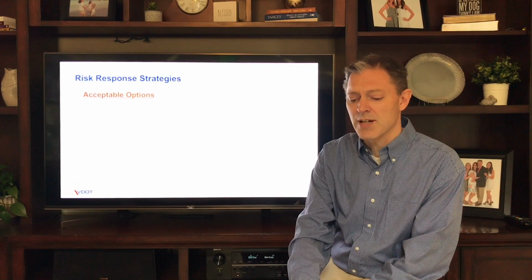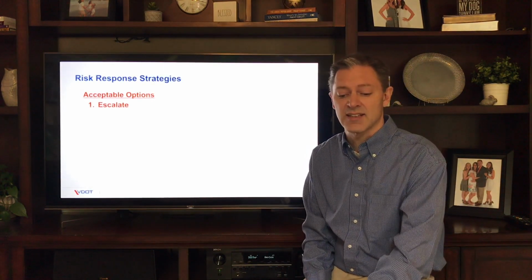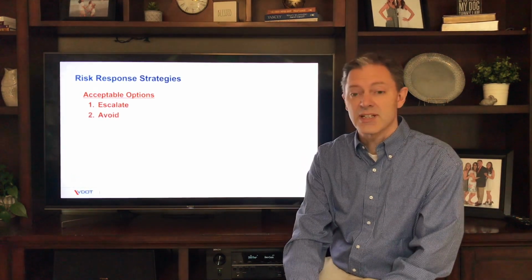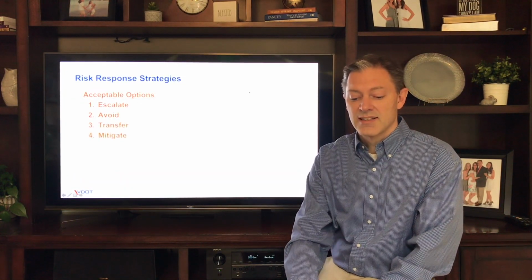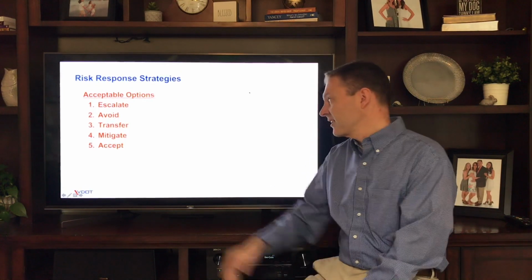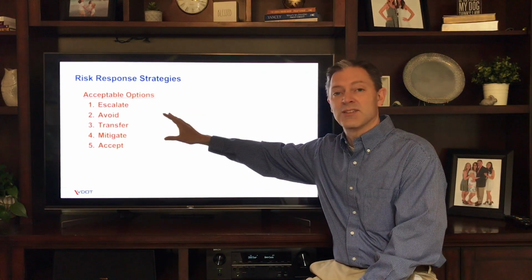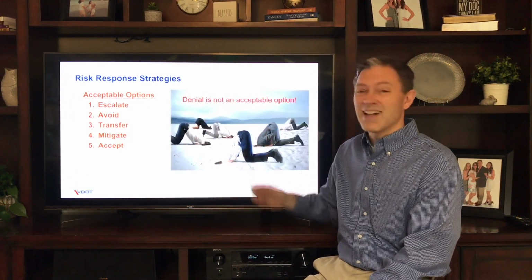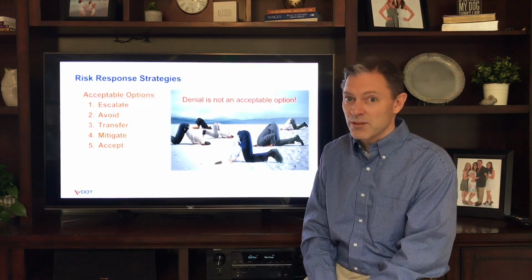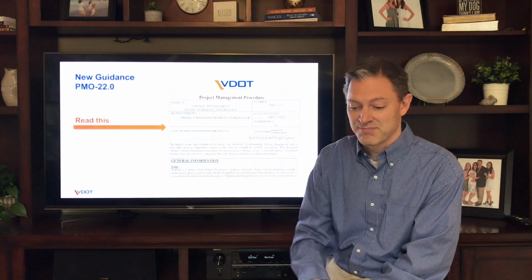So some acceptable options on how to deal with risk. The first is to escalate it. The second is to avoid it. The third is to transfer it, then mitigate, and finally accept it. And these are the industry standard responses to risk. This is what you should do when things come up. It's important to note, denial is not an option. It won't get better if you just stick your head in the sand.